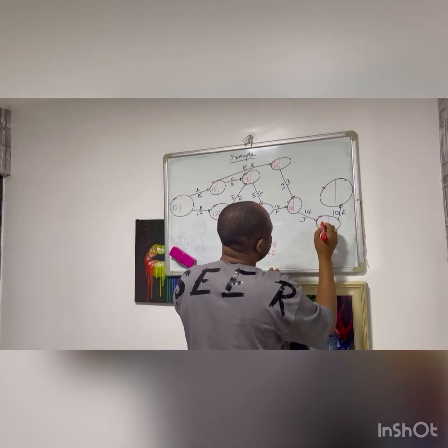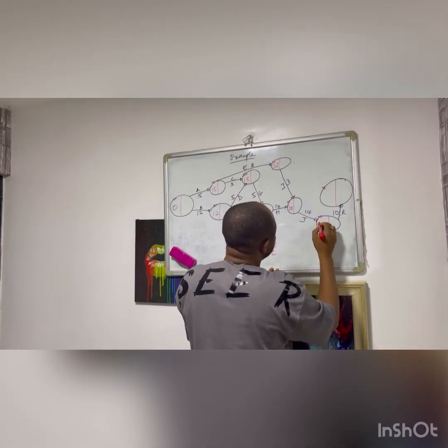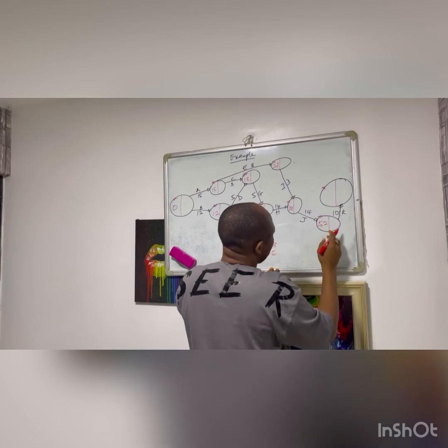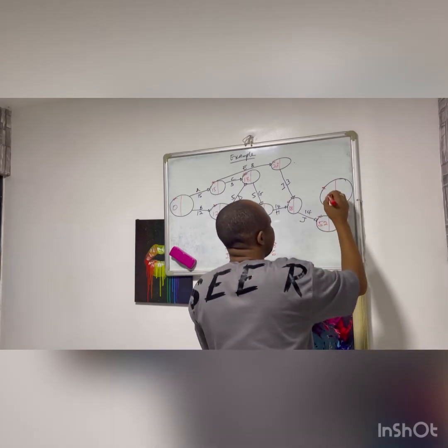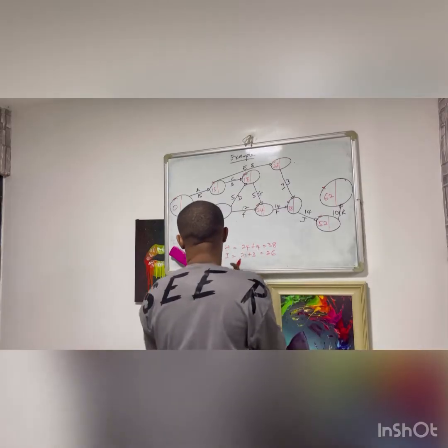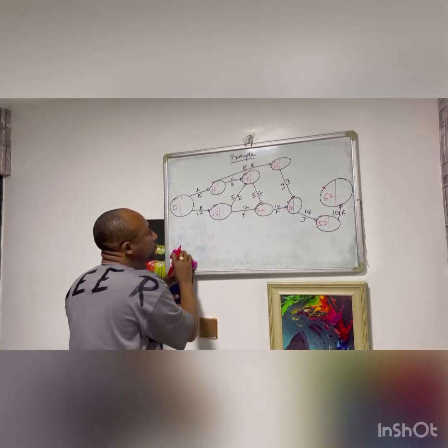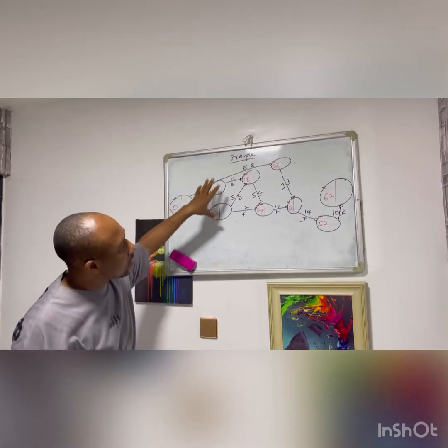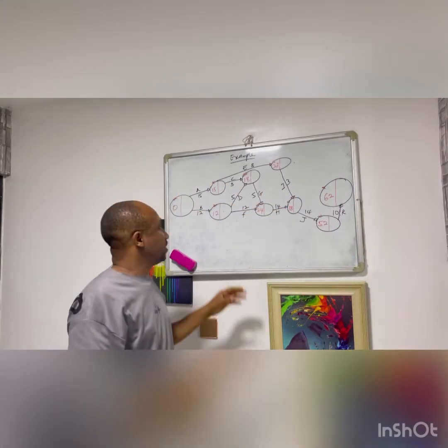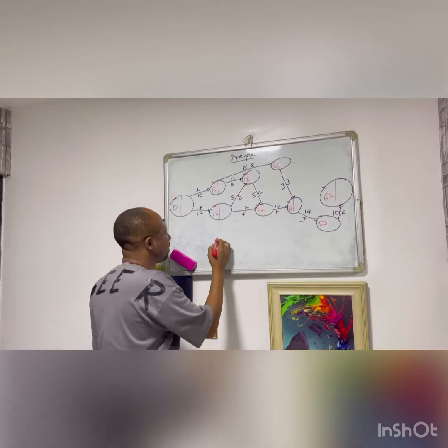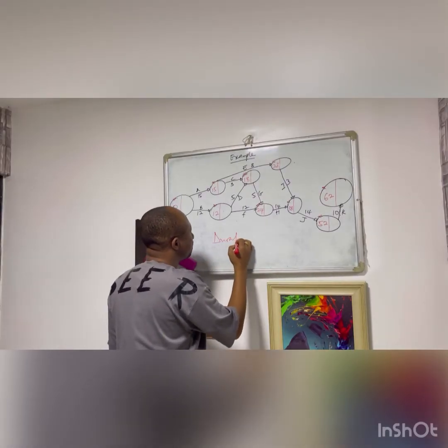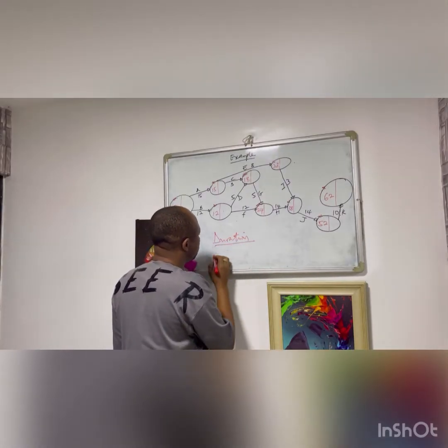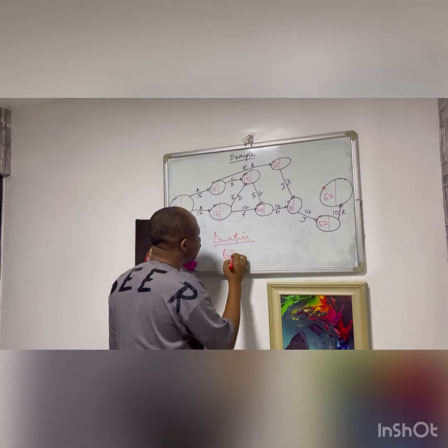That means activity J will arrive here, we finish in week 52, while activity K will arrive here in week 62. So having done this simply indicates that the duration it will take to complete this project is going to be 62 weeks.